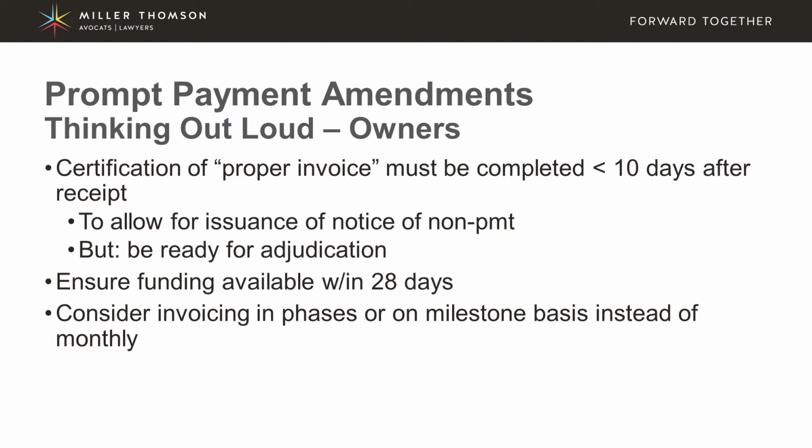They have to be ready and able to respond in a very short time frame. So that, as I mentioned, the owner can get out the issue of notice of non-payment within the 14-day period so that it's not obligated to pay the entire invoice. But at the same time, the owner should also be ready for adjudication, because once that notice of non-payment is sent out,